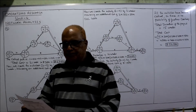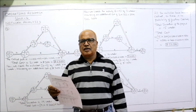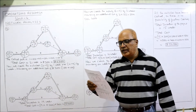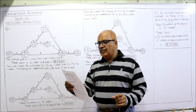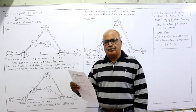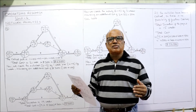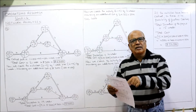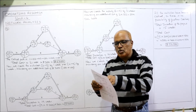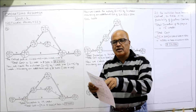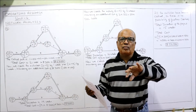See the fourth problem: obtain the minimum cost and optimum duration for the following network. Activities are 1→2, 2→3, 2→6, 3→4, 3→5, 4→6, 5→6, and 6→7. Normal time in weeks, crash time, and cost slope in rupees per week are given. In the earlier problems we calculated the cost slope, but in this problem the cost slope is directly given. For activity 1→2, there is no cost slope because normal time and crash time are both the same — we cannot crash it.